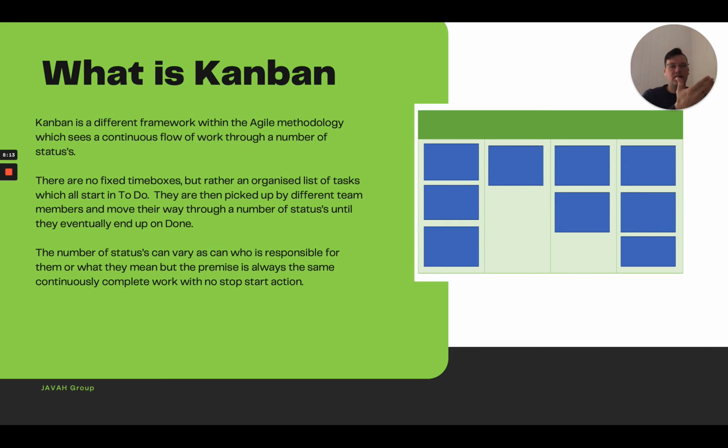And then equally with a Kanban board, you can have those defined periods where, when you're looking at that done pile or that done column or that done list, once you get to a certain point of value in that list, you can then schedule a deployment and push those things out. This works really, really well. I've enjoyed working with Kanban. I've worked with teams on both.